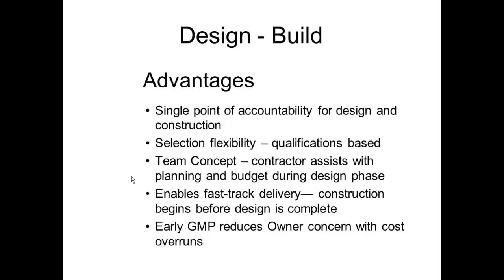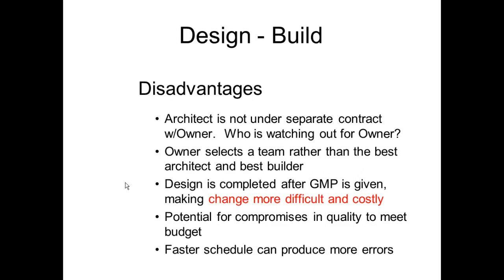You ask them to add some more doors and windows or some more expensive flooring or something above and beyond the original concept or the scope, you're going to pay, and sometimes you pay dearly. So it's very important to make sure that what you've designed is what you want, and that when people come in and say, geez, it'd be nice now that I'm seeing it built that we add this, that you kind of have limited them to what they can do.